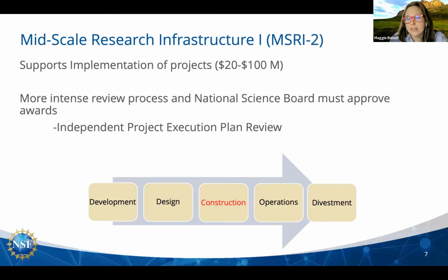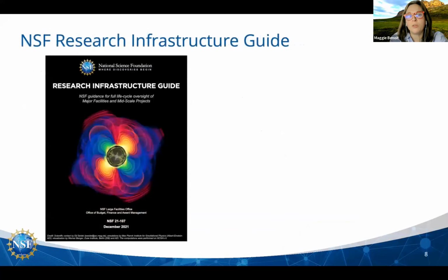These are reviewed by the National Science Board. So they're similar to the MREFC projects where they get a significant amount of scrutiny. They also go through an independent project execution plan review. So the scope, schedule, budget, risk analysis, and project management methodology are significantly scrutinized and have to be extremely well developed. If it fails that review, it gets kicked out of the program. So the science and technical parts of the project are important, but the execution plan for achieving those goals has to be watertight.